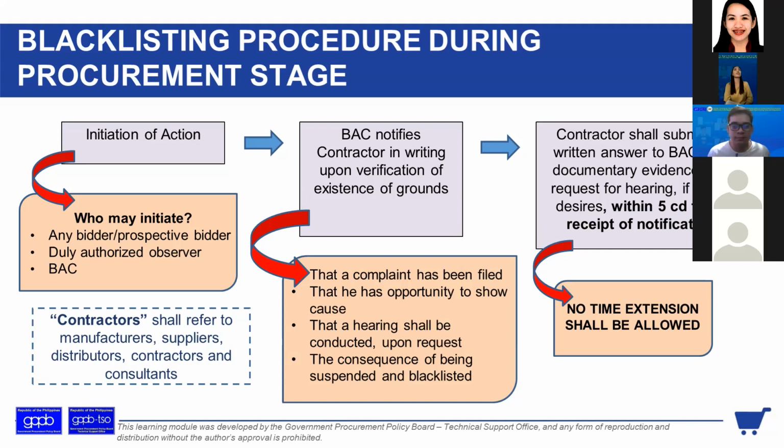So it is part of the due process, no? To give the contractor an opportunity to answer all the allegations against him or against her or against the company. So the contractor shall submit its written answer to the BAC with documentary evidence and request for hearing if he so desires.